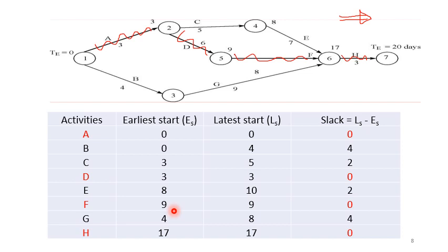So in that case, you add an artificial or fictitious activity, an activity which is not actually present, but is just added in the network to make your calculations easier. That dummy will have a time of 0 because it's not a practical activity at all. It will be shown as a dotted line in the network. So we'll see that in the next session.